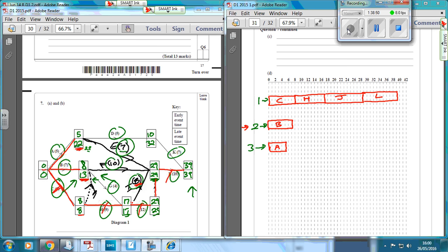Okay, and then once we've set those, we then wind the clock forward. So we now go forward, so 0 minutes, everyone's busy. 1 minute, everyone's busy. 2 minutes, 3 minutes, 4 minutes, 5 minutes. As soon as you get to 5 minutes here, worker 3 becomes free. So now, the ones that can start after 5 minutes are this one here and this one here.